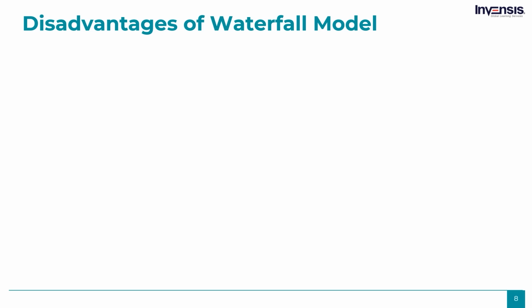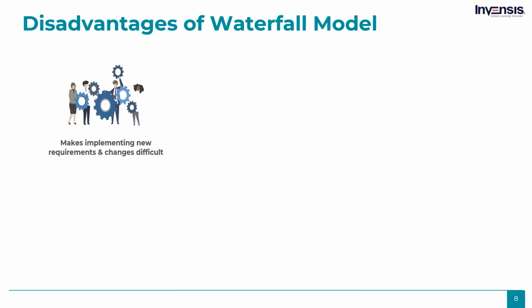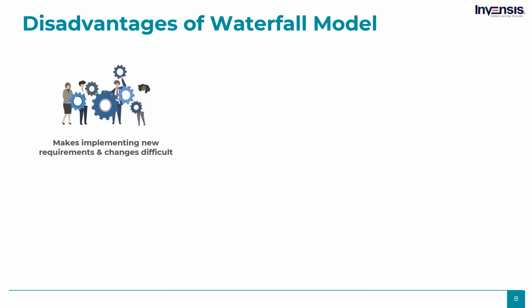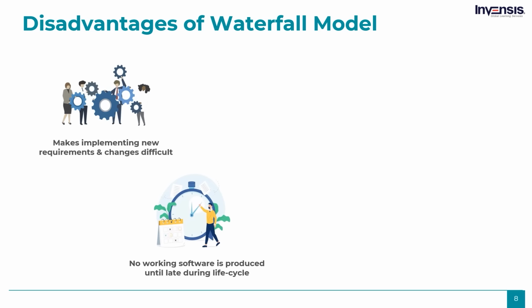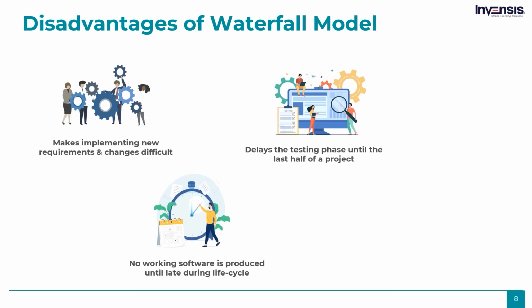This approach may sound fine when you know what you want to build, but it can be too restrictive for some projects where requirements keep changing. Also, Waterfall prioritized bringing a complete product to market, meaning, it could take years before teams finished the project at hand. And of course, waiting until the end of a project to test the whole thing can be problematic. If you catch a bug at the last stage, it can be messy, or even fatal, to try to go back and fix it. At times, some software projects would get stuck and simply never ship.